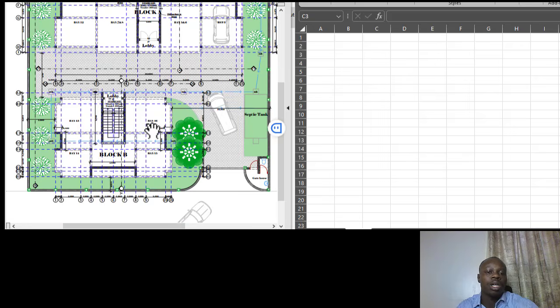And of course, presumably, maybe you might have gone to the site or not. If you haven't gone, then you should be having information, especially concerning the geotechnical properties of the site in which the construction is supposed to be done. These are going to help you give informed dimensions or levels of what we call excavations.